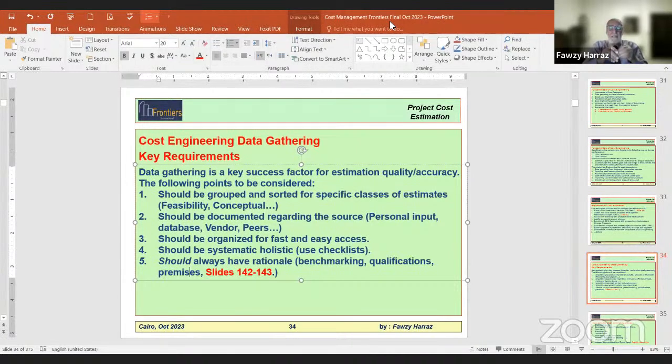Sometimes I will discover that the job is underpriced and I will not complete it normally. I may cheat with the specifications, I may cut corners, I may do something wrong because I will not get my profit as a contractor. So if you take a bid price substantially below market because it's the lowest bid, you are getting a toxic contract. You will have a problem.